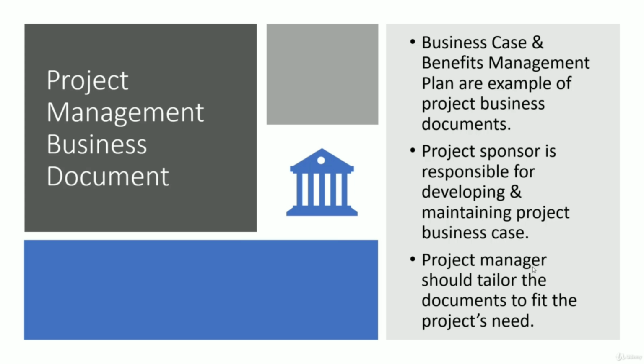And last, we have project management business document. So, business case and benefit management plan are the example of business documents. Project sponsor is responsible for developing the business case, but as I have mentioned earlier, this is usually delegated and maybe project manager will create. But in many cases, business analysts are also asked to create this document. But project manager or business analyst, whoever is creating this document, they need to make sure that it fits the agenda, which is to satisfy the project need.